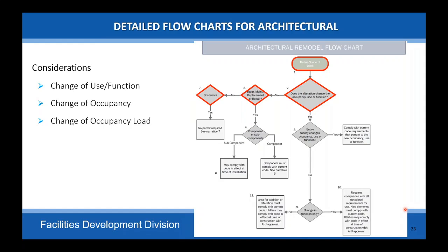Let's look at if it was cosmetic. Cosmetic does not typically require a permit. We're looking at paints, carpeting, tile. You're just replacing what's there. What we do ask is that you notify the compliance officer for the facility and let them know that there's some work going on, so they don't come out and see something happening and not know what it is.